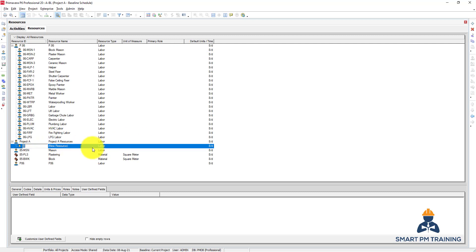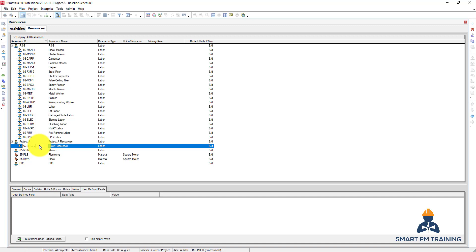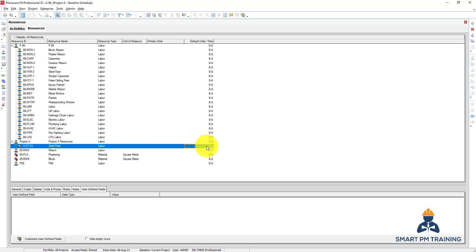I click Insert and I can start creating the list of resources right now. So let's say that we have a steel fixer we can hire for the foundation work. This is a code; I will just give it a unique ID, and this is a complete description. And this is a default units per time.